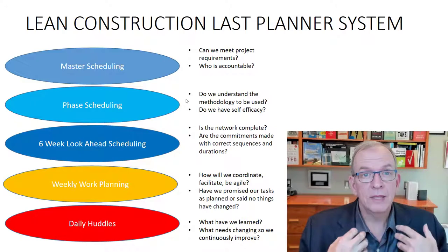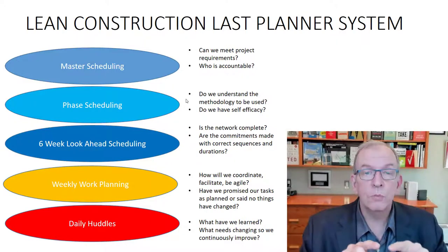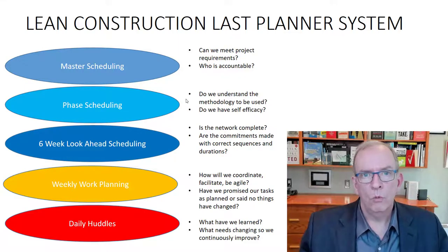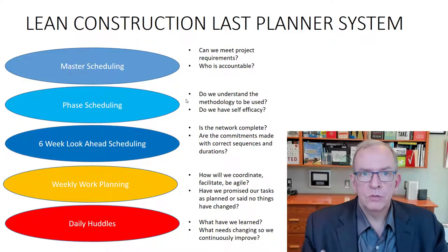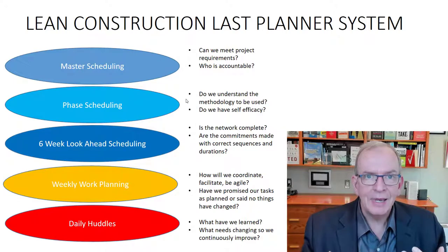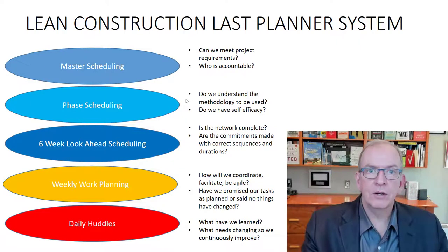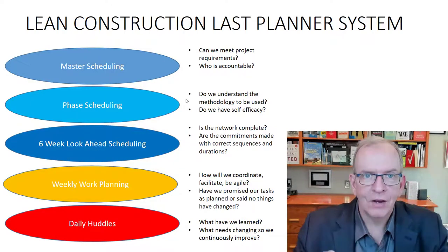And we call that the gives and the gets. They fill out little post-it notes that really detail what one of the contractors is supposed to receive. What do they need in order to start their work? So what do they need to get? And that really tells the other contractor what they need to give to that contractor.